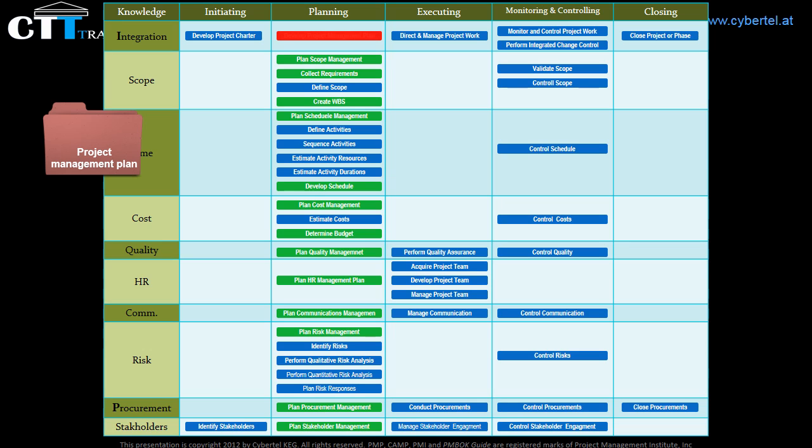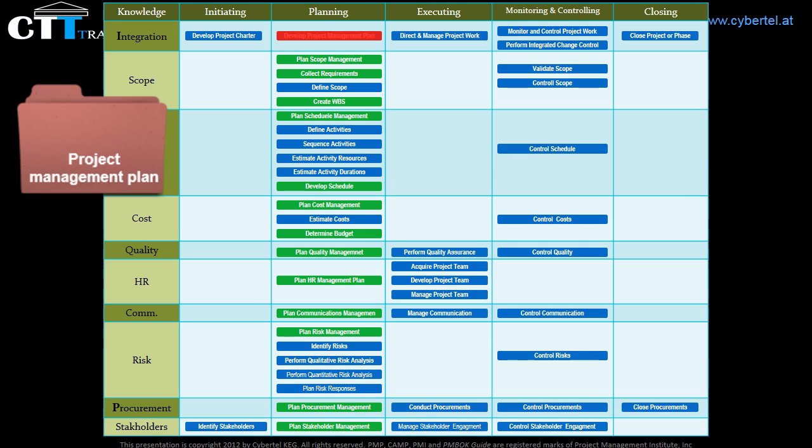The project management plan will always expand throughout the project period. It gets updates and information changes from other processes. That means it is progressively elaborated. And keep in mind that the project management plan should be aligned with the program management plan if the project belongs to a program, which will help the change control board, which is called CCB, to achieve more efficient change management.